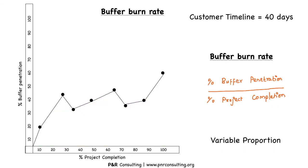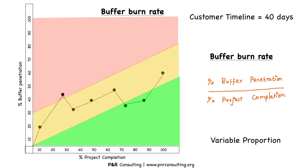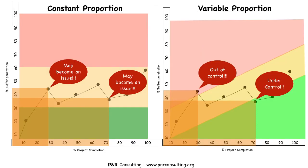That is where we use the variable proportion model. Here you can notice a much better buffer zoning idea, wherein the acceptable penetrations are at variable proportion. As the project moves towards completion, we allow the project to consume more buffer, indicated by a bigger green zone and a smaller red zone — this is more logical. Comparing the constant proportion and variable proportion graphs, we can understand that the variable proportion buffer graph shows a more realistic situation, helping us monitor the buffer in a foolproof manner. However, there is a catch: most status reports are human-prepared, and unless they are transparent enough, even with this monitoring the project will be doomed to failure. This happens because of fear of punishment, which is due to wrong metrics — bringing us back to the need for metrics designed to ensure proper behavior from a team.